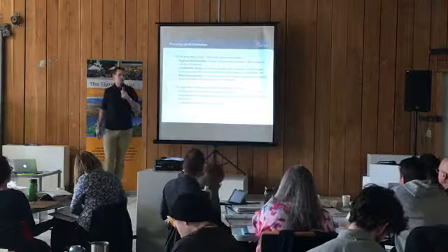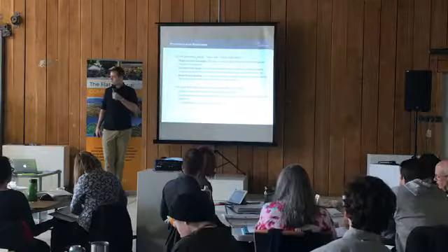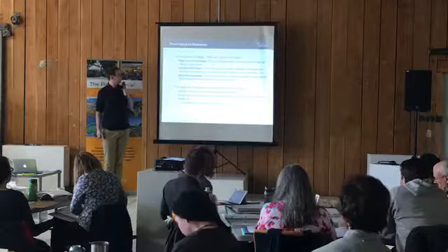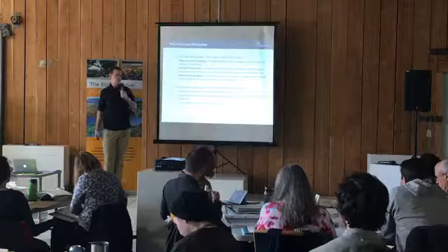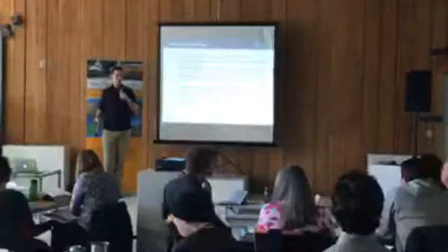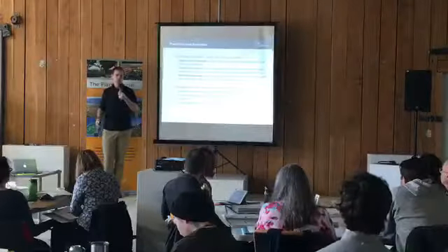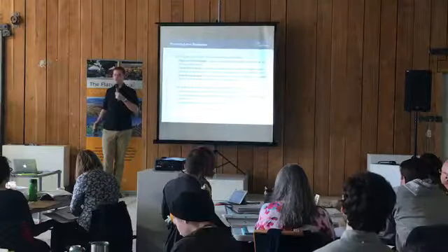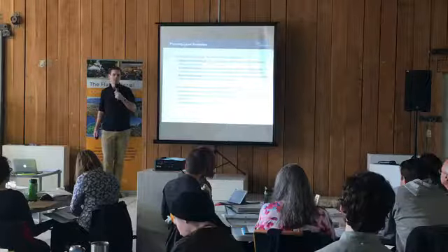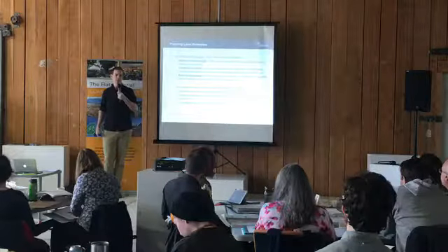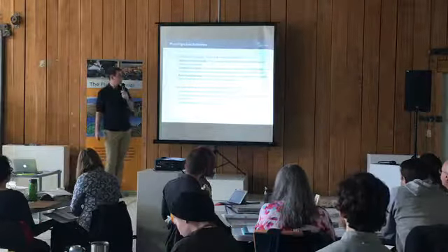Some of the types of unknowns at the planning level that can influence uncertainty in cost estimation include the scope of the project. So right now, I think you've all seen the drawings that have been produced and form the basis of the estimates. If there's changes to the scope, for example, if there's additions to create improvements to nearby or adjacent streets added to the scope of the project, that changes the costs.